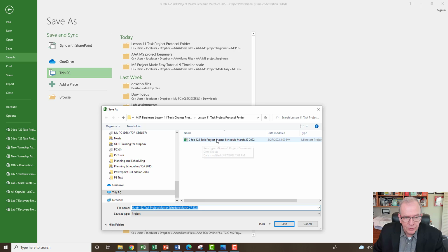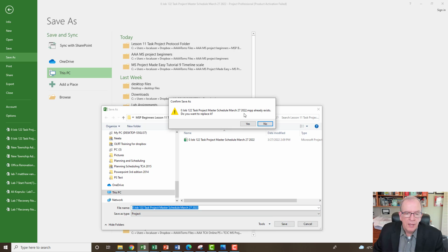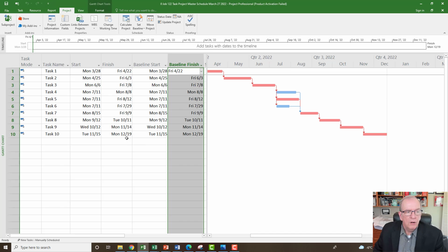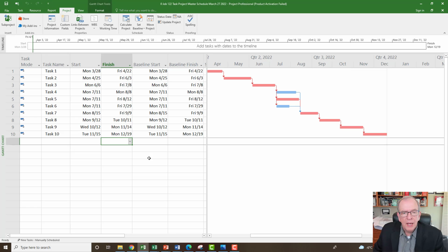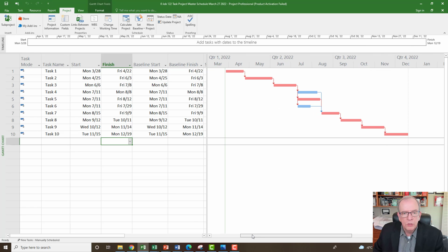And master, so I've got master schedule. You might put either master or master schedule, and then the date. If this is the date that you've set the baseline, then that's fair enough. You could put that as the date and click save. Because I've already saved it, it says, do I want to replace it? I'll say yes. Okay. All right, so we've got that saved. And now the next step is we would do an update.